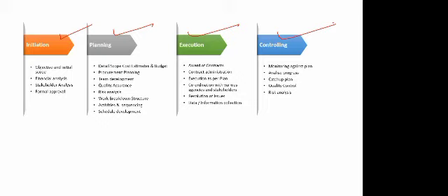It takes time. You need to move into the planning stage. You need to do a proper survey and take care of things like whether the land is available or not, all those things, right? So in the initial stage, you just go ahead with the initial scope. You do the financial analysis. If the project is going to come up from any government agency, then they will look into the budget, whether we have a budget this year or